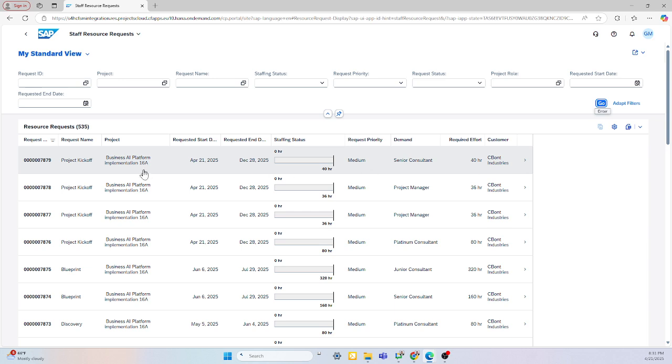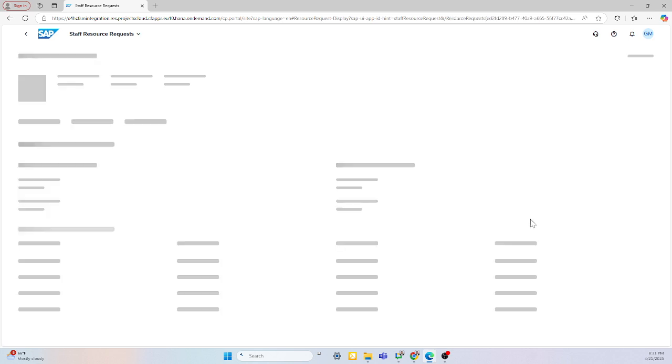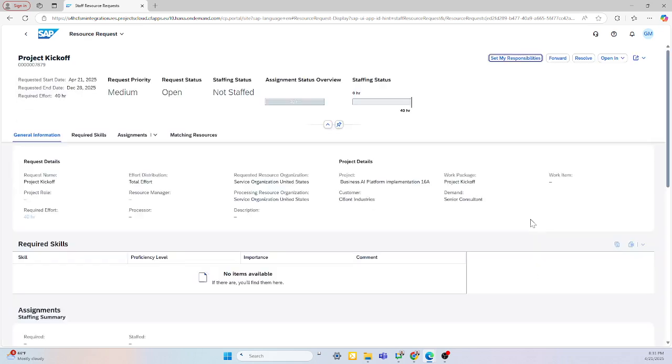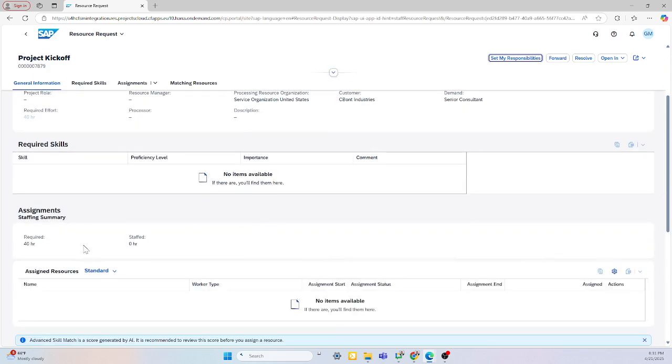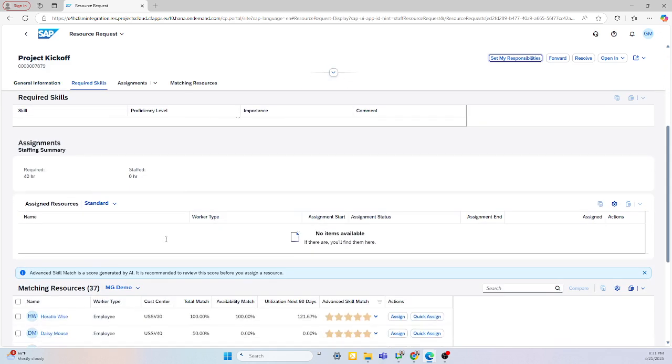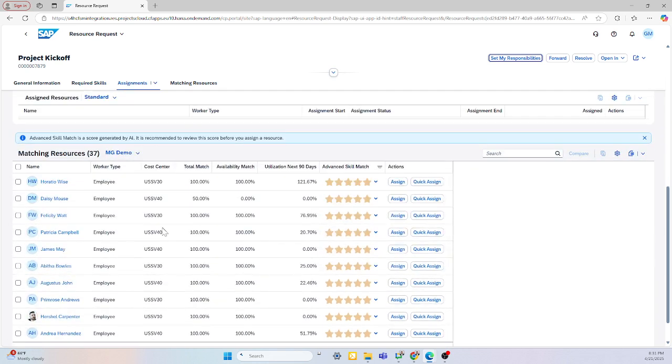For example, for this project, I have a staff resource request for a senior consultant. I can view the request information, such as the details of what's taking place in what project, the hours needed for this project. If there are assigned resources, that would show here, and now here I can assign resources at a full view. It gives me an availability match, as well as a skill match.